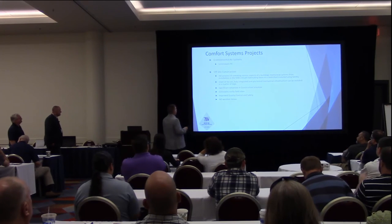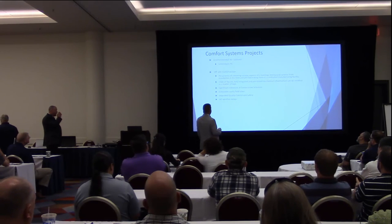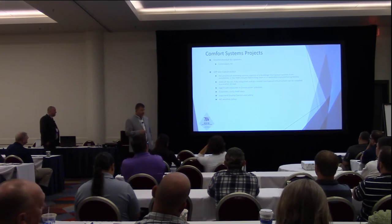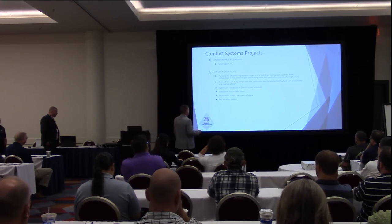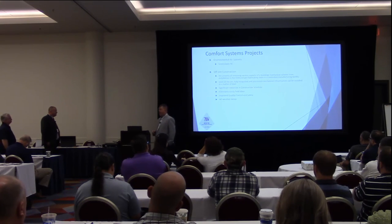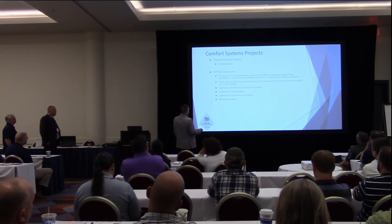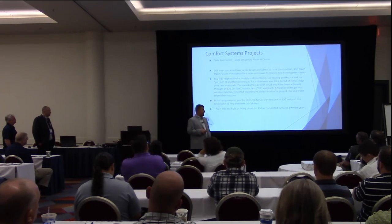So let's get into some of the Comfort systems, specifically EAS over in Greensboro, North Carolina. They do something called offsite construction, and they're very good at it. So basically what they're doing is they're figuring out what parts of the building can we take and manufacture offsite while the rest of the building is being built, and then we'll deliver it to you when you're ready. Okay? So, obviously, construction schedule, labor, no weather delays because it's all built inside the building, okay?